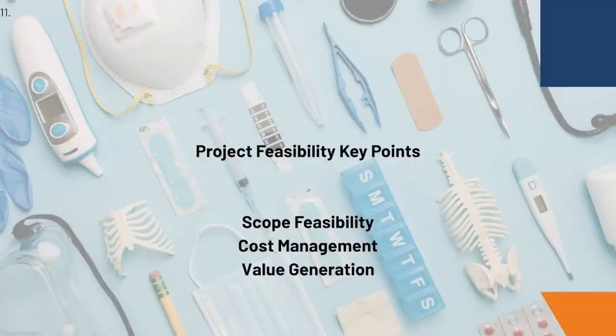Feasibility of scope. The system should be tailored for private clinics in Hong Kong, focusing on electronic medical records, appointment management and billing. Treatment records from other providers should be included without expanding the scope unnecessarily. Data security and compliance must be prioritized from the design phase to minimize legal risk, ensuring the system meets the specific needs of healthcare professionals.